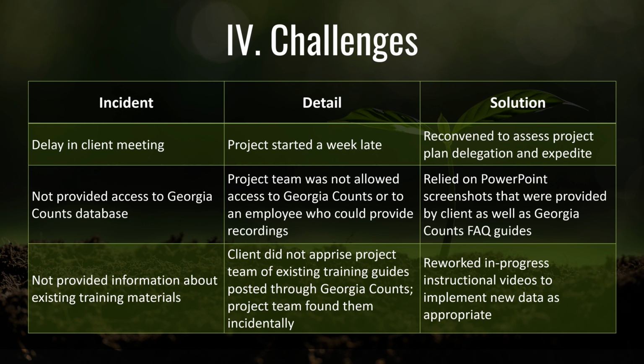These are the challenges that we ran into during the development process. Some of the incidents was delay in the client meeting. So we got about a week of a late start on this project, and on a short summer class, that's definitely quite the chip taken out of it.